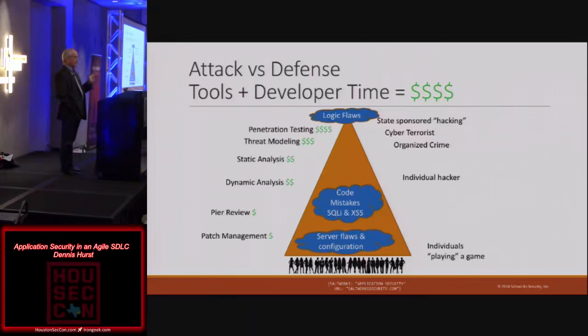Scrum and Agile are very much about staying hyper-focused. I'm going to build these 5 web pages. All else goes away. Now, at the end of building those 5 web pages, we do what's called a reflection. That's where we put our head up and go, okay, where are we at? What's going right? What's going wrong? But then we go back in our cave and build our code again. If you're not in that process with them, or if your technologies and methodologies aren't in their process, you're going to hurt because they're not paying attention to you while they build.